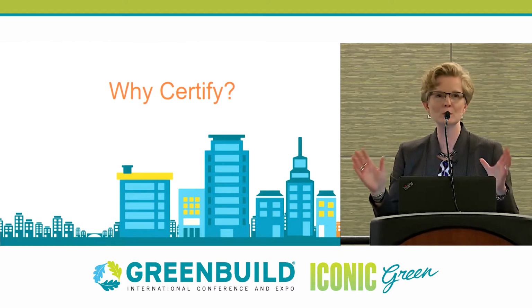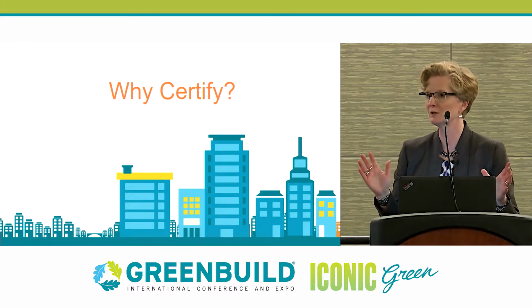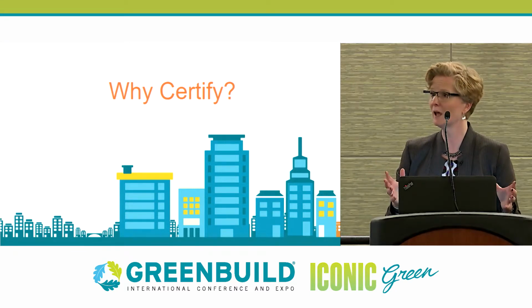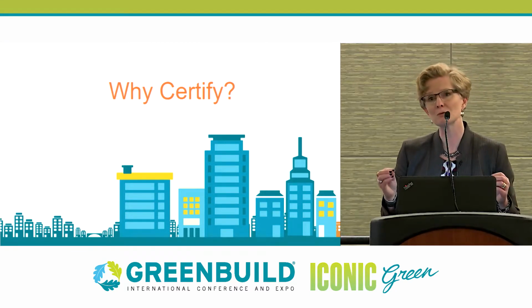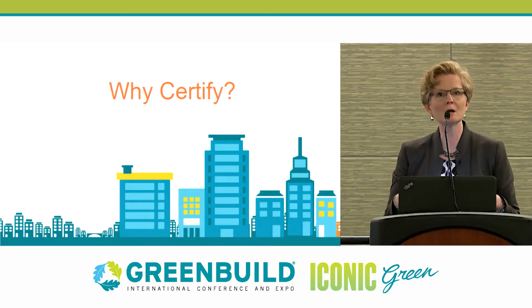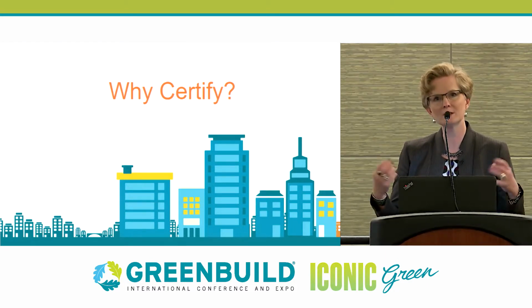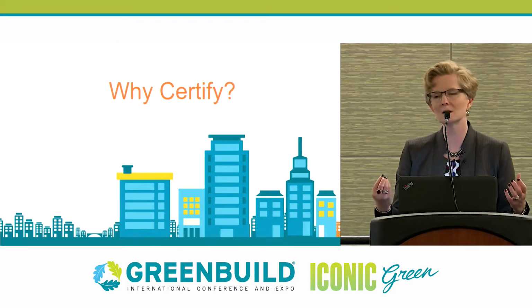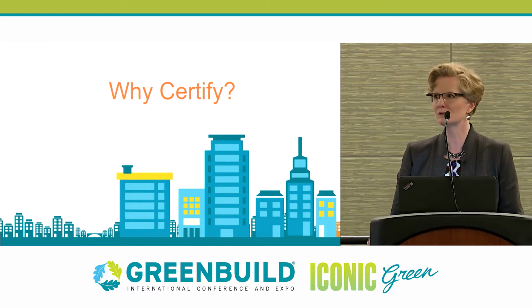How many of you, we all experience it, value engineering during the process, right? From design through to construction. It's a very important process, but if you haven't got an independent check, you might value engineer out really important elements of the building that can lead to greater durability, lower operating costs. So that's another factor where having this independent check really becomes a valuable aspect of the project's life cycle. Do you have any other thoughts from the audience? It's good to share these ideas.